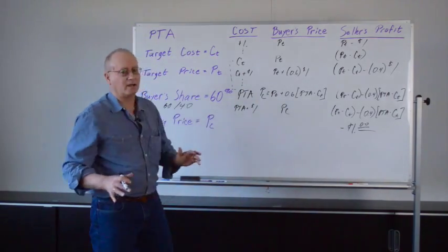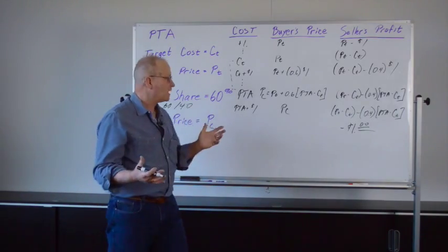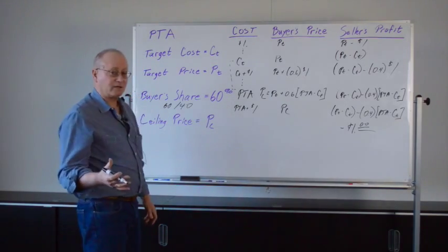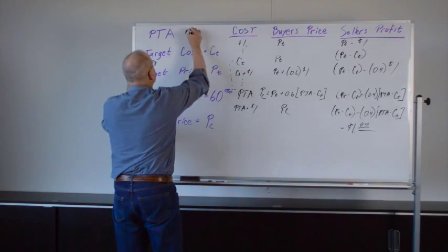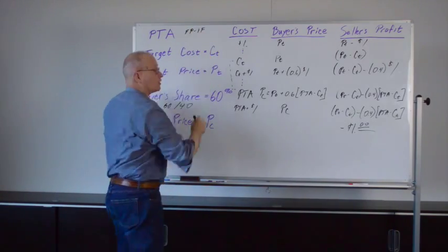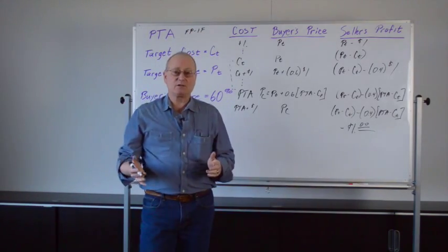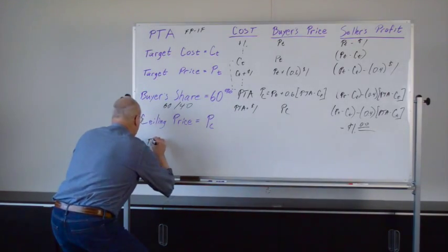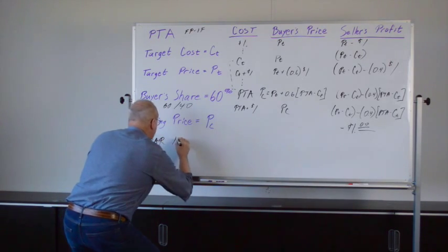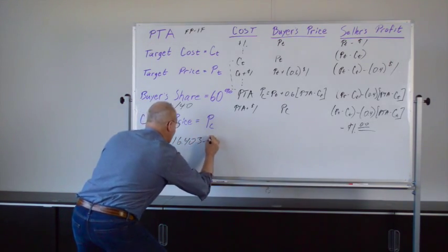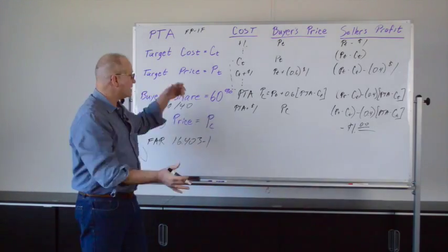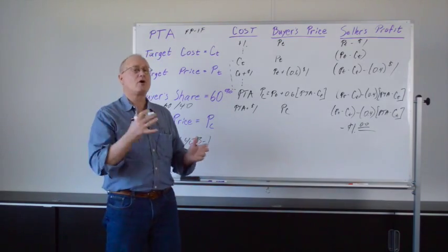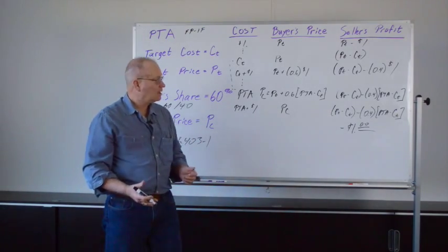Now this doesn't look like a fixed price contract, but in the study guides you'll see indeed they say this relates to a fixed price incentive fee type contract. And if you'd like to see that someplace else, you can look at the United States Federal Acquisition Regulation, FAR 16.403-1. And here you'll see the exact same terminology, and they call this a fixed price incentive firm target contract.